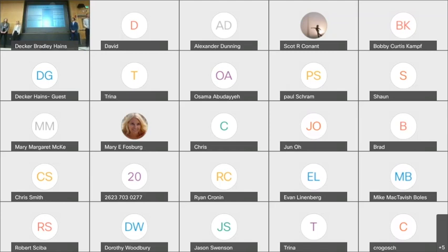These next couple slides highlight the largest difference in cost between the two layouts. Looking at the table on your left, the public stormwater and utility costs is broken down into 4 different sections, being the public water, sanitary, storm system, and the connection to Paw Paw. As previously stated, water and sanitary lines do not currently come to the site. Those both end around the eastern village limit of Paw Paw. So that is one major cost to consider for this layout that obviously doesn't have to be considered for the private layout. And the total cost for everything comes out to an estimation of just under $4 million.